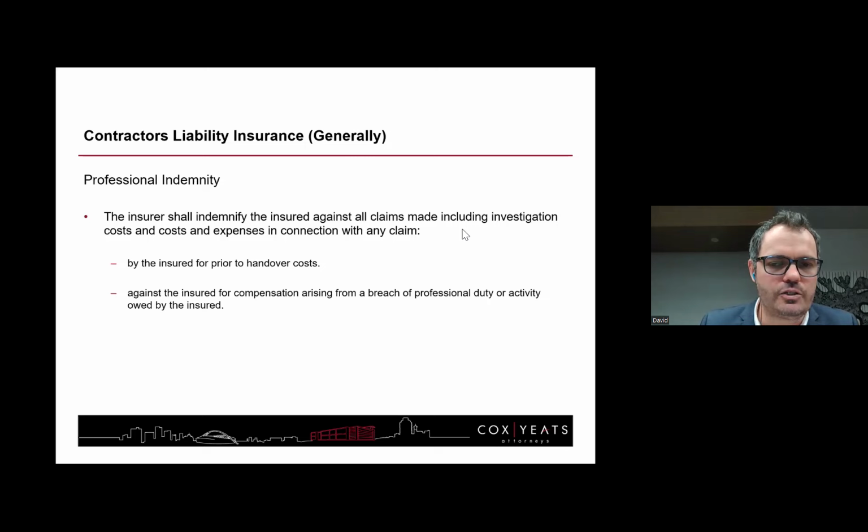Dominic, your question: whilst in construction stage, what are the requirements of those on site? So interestingly, you asked that. Construction regulations were promulgated under the Occupational Health and Safety Act in 2014, but nobody reads them, like stop signs written on the road. They dictate all of the appointments that have to be made, and they dictate that the people appointed in terms of the regulations have to be competent. And competence is determined in terms of those regulations per category. So you can't just appoint someone off the street. They've actually got to be competent, and they've got to show they are competent.